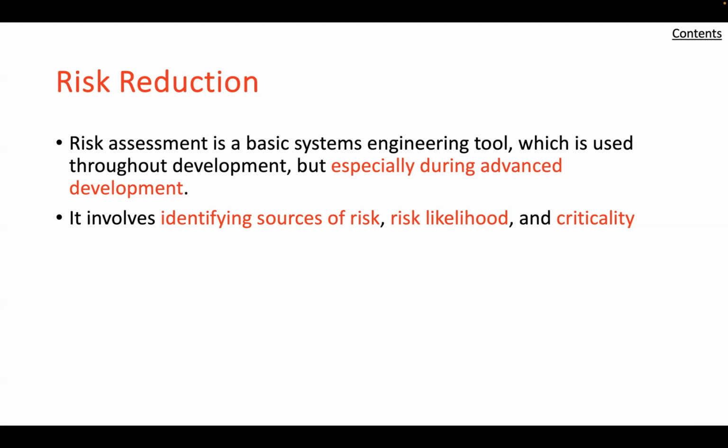We have advocated 2 primary methods to reduce risk within the phase: prototype development and development testing. While both methods could certainly be implemented earlier, it is not until the advanced development phase that sufficient information on the system architecture is available to properly implement prototyping and advanced testing.